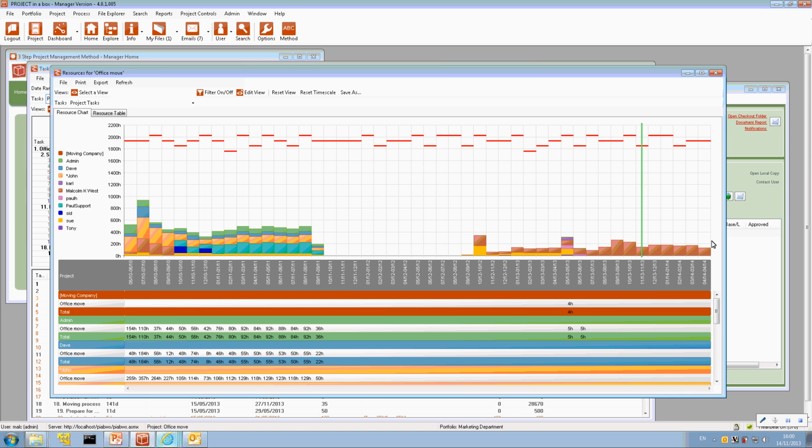So we've got associated with that some data from the resource profile coming from Microsoft Project and some coming from Planner. In some cases the same people are working on each task, so we've got Sue in here and Sue in here, and that's because our lookup, which ties the resource name in the plan to the user in the system, will work on either. It's just looking at whatever name is in the resource field, and if it matches one of the resource names tied to the user, then it puts those tasks against that user's particular profile.